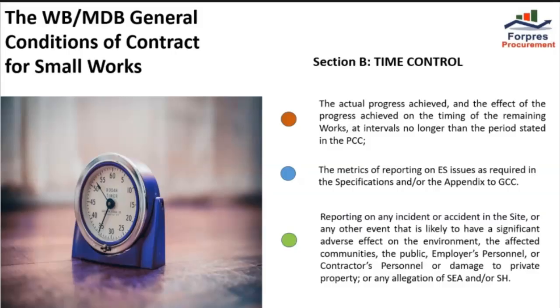The project manager shall extend the intended completion date if a compensation event occurs or a variation is issued which makes it impossible for completion to be achieved by the intended completion date. If the contractor has failed to give early warning of a delay or has failed to cooperate in dealing with a delay, the delay caused by this failure shall not be considered in assessing the new intended completion date.